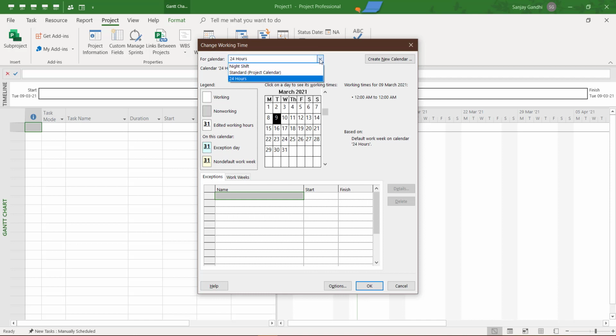If you go to the next option, which is night shift, for example, this gives an example to start your day, for example on Monday from 11 p.m. to 12 a.m. and then at the break time when the date changes, we should not be extending the range to 1 a.m. for example. We should be using 11 p.m. to 12 a.m. over here.